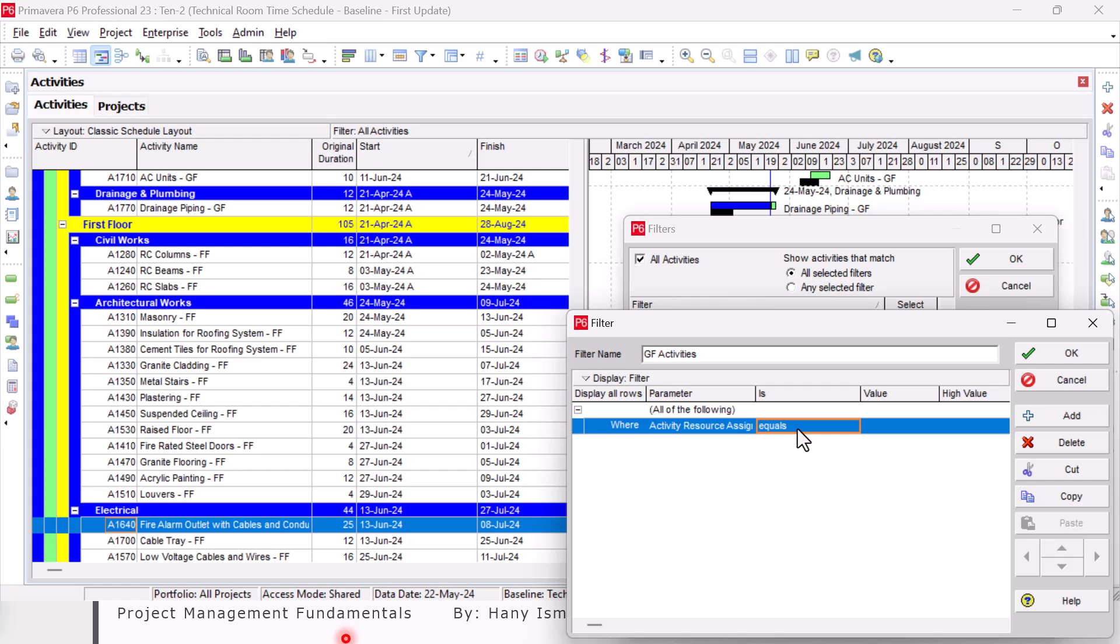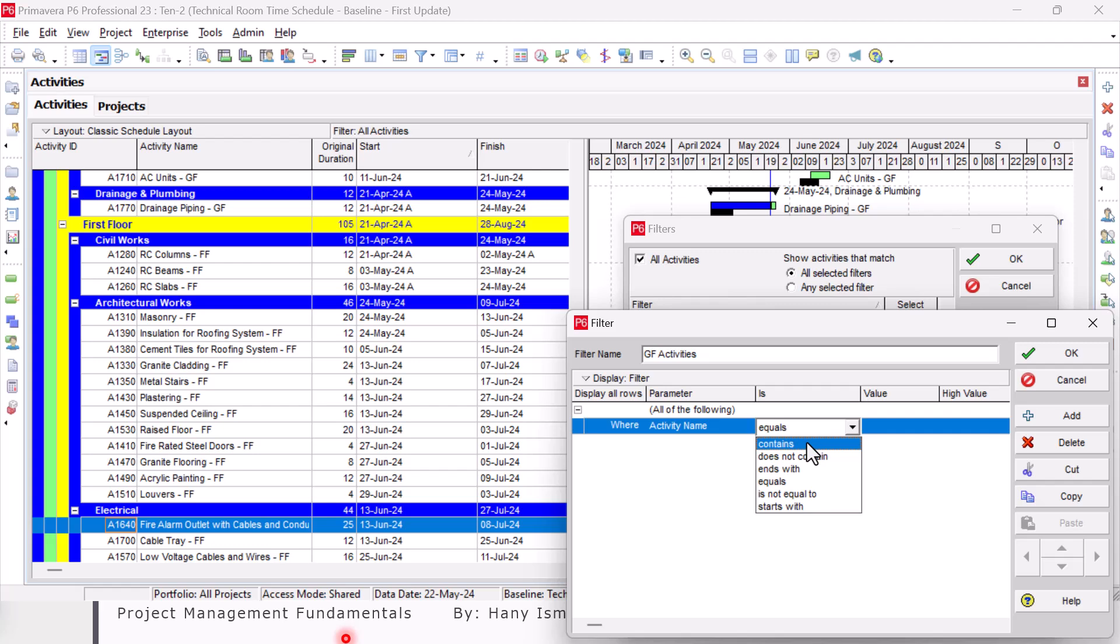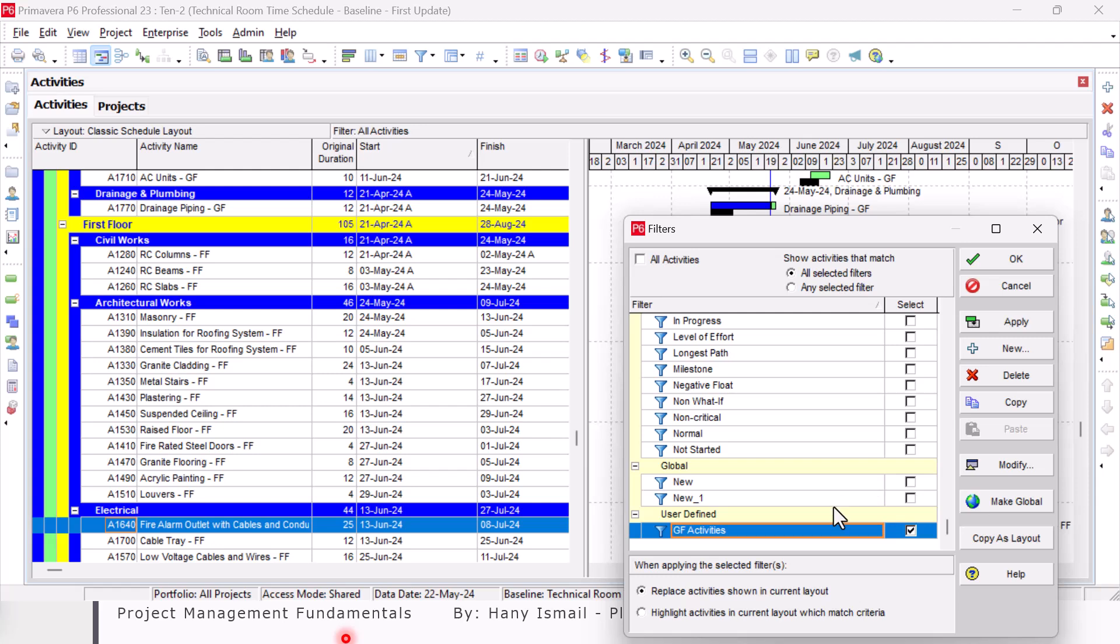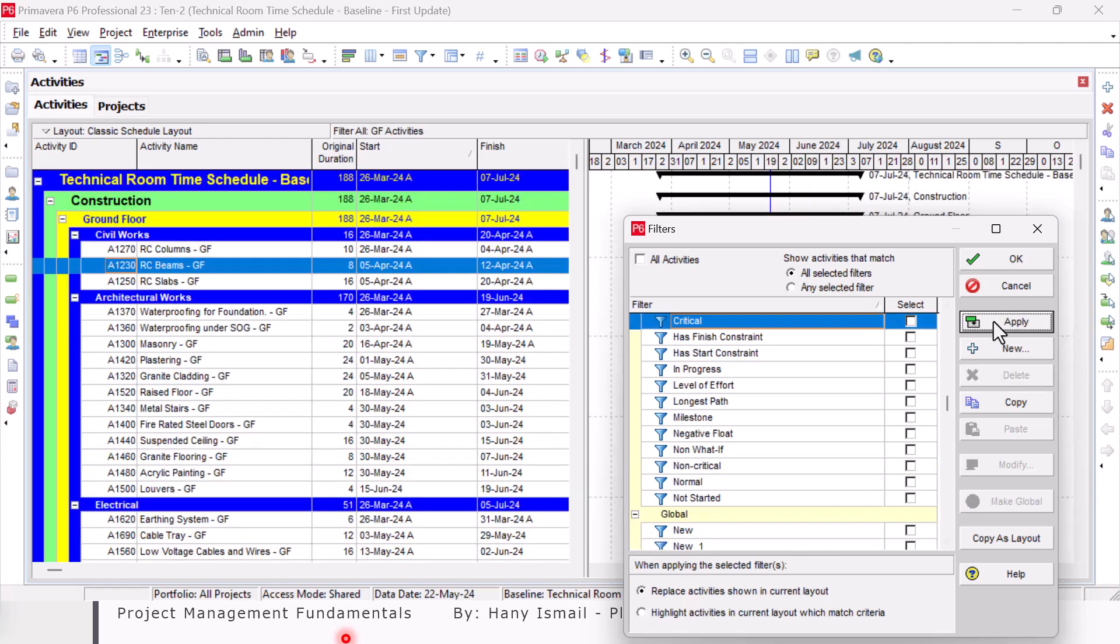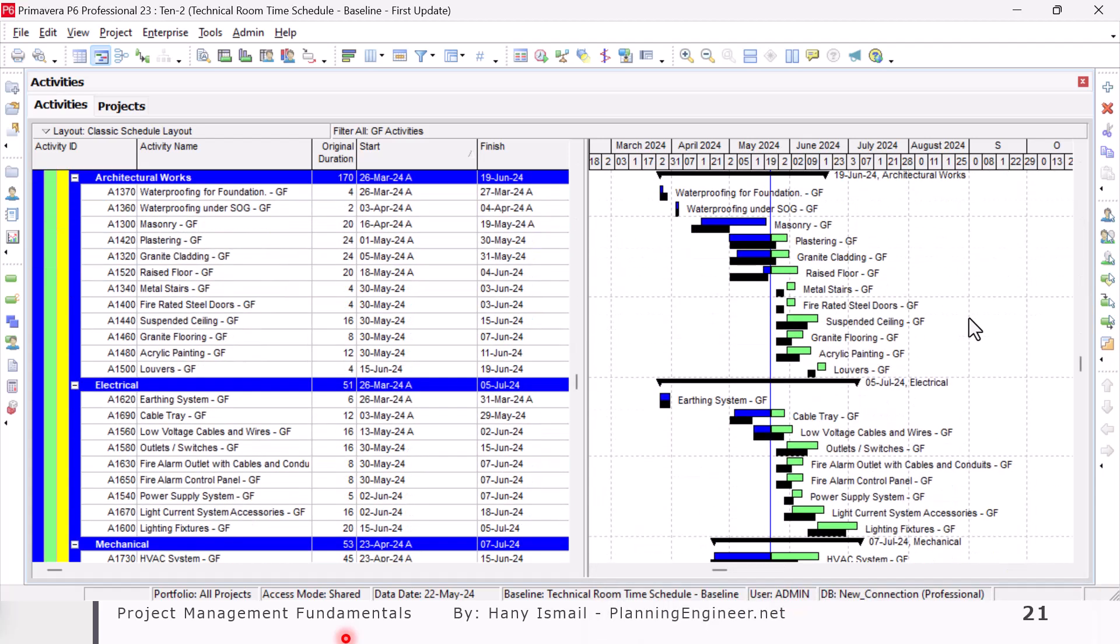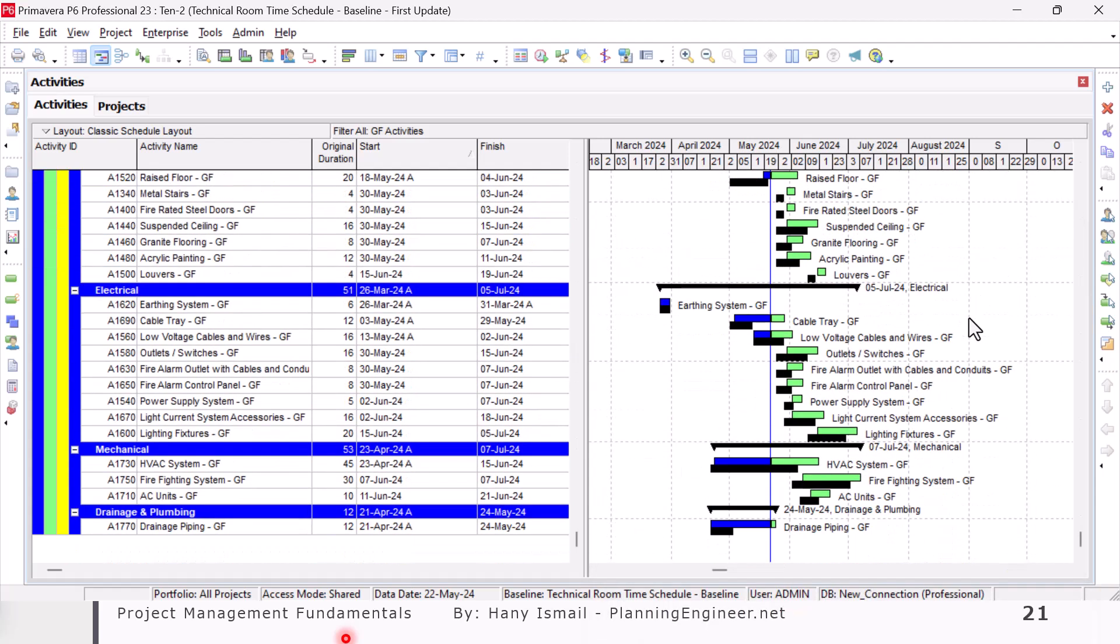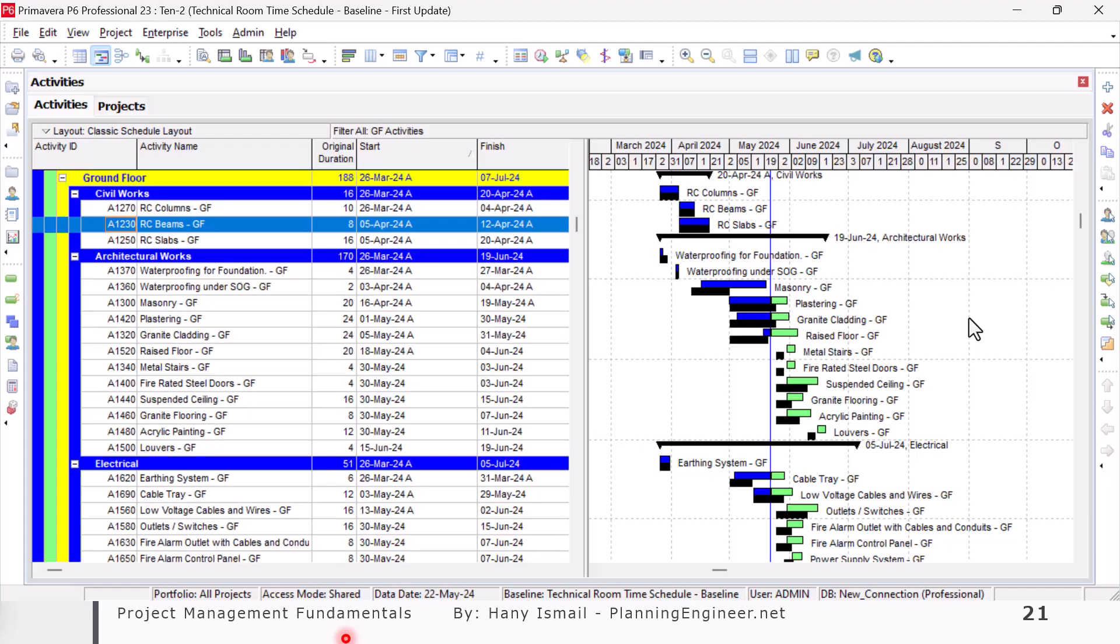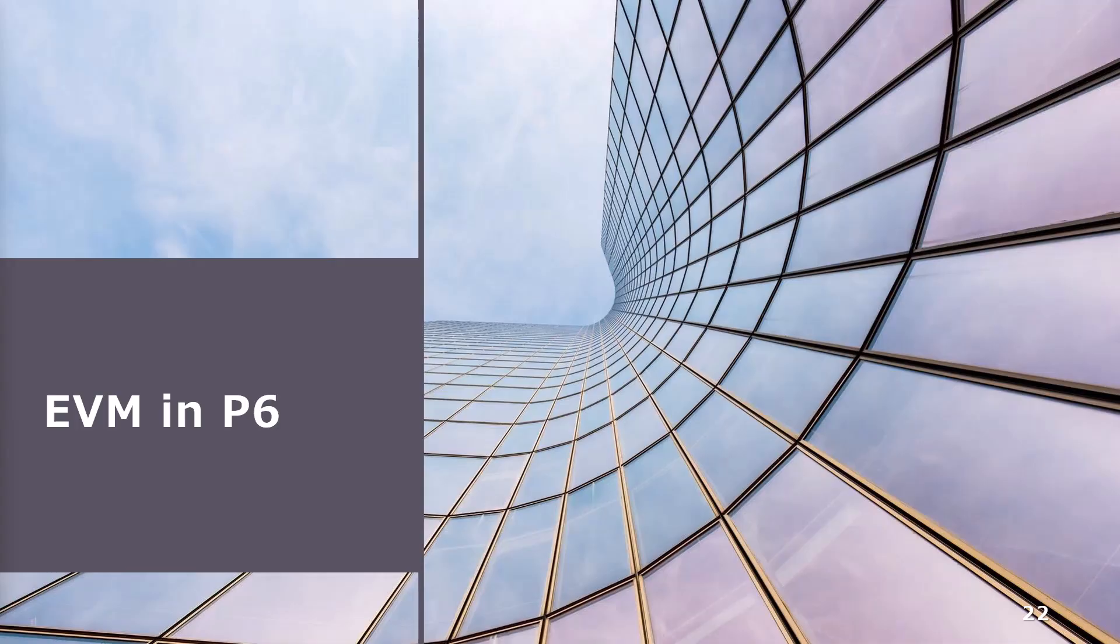Here I will choose from here Activity Name. Don't use equals because equals will give you the exact one. I need only contains. So from here, Contains GF. Click OK. I have here my filter, and then I'll click Apply to see the activities with this criteria. As I can see here, only the ground floor activities are shown.